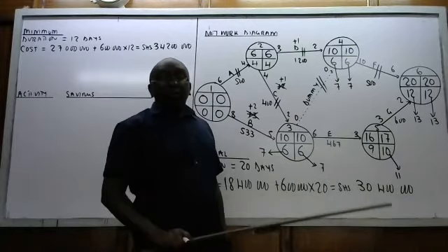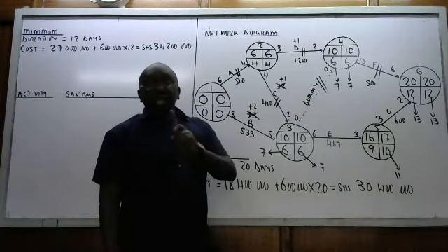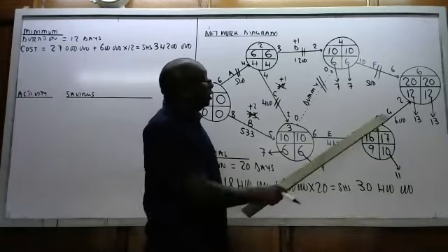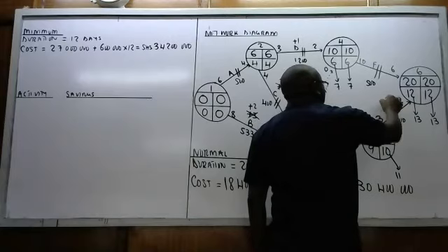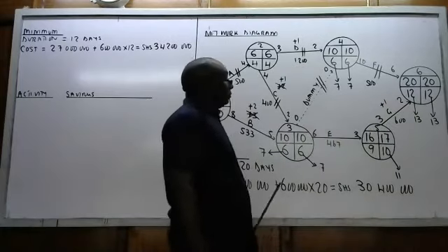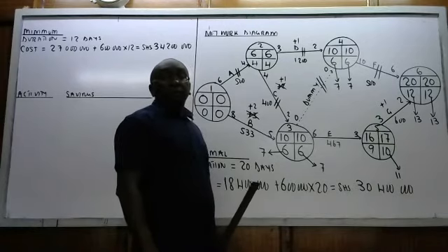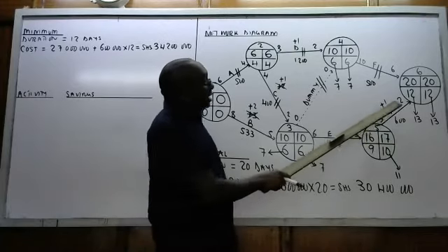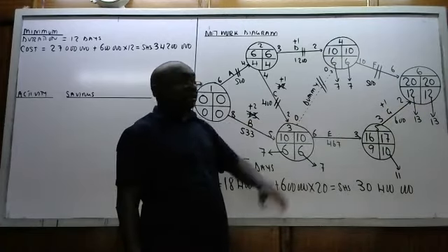From there, we have 2 activities remaining, E and G. We start with the higher one. This one has been denied 1 day, so we come back here and add 1. Now that this one is coming to the end, we start from the end to argue like this.